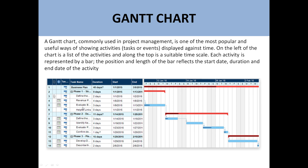For example, these are the task list, then the duration, start date, and end date. Here is the representation of each task in terms of a bar. The bar shows how much time each task will take, and what are the dependencies of each task on another. For example, when this task will finish, then this task will start, and then this will finish, then this will start.